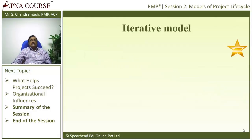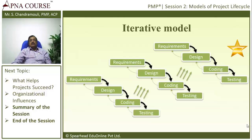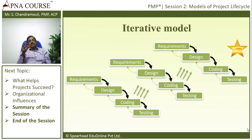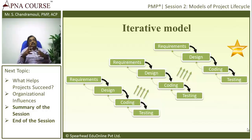The next model is the Iterative Model — doing the same thing again and again. In this model, the requirement phase is executed multiple times. For example, module one goes through requirement, then design, then coding; then module two goes through requirement, design, coding, and testing. The requirement phase, design phase, and coding phase are all executed multiple times because we go module by module.